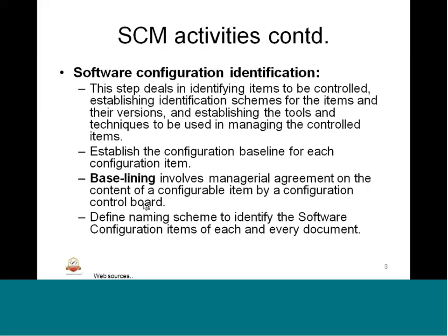Similarly, we can have baselines for the test artifacts also, like test cases. So we have developed the test cases, and we come to a conclusion saying that these test cases are enough to go ahead for the next stage of activities. So we say that the test cases are frozen. This frozen is nothing but the baselining. Define naming scheme to identify the software configuration items of each and every document. That means naming scheme and identification of that configuration item is also an important aspect. So that also will be done in the SCM activities.